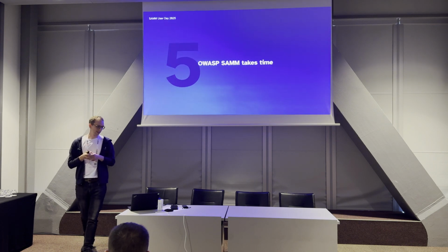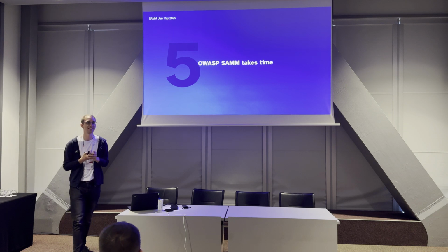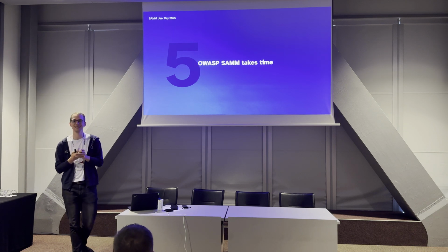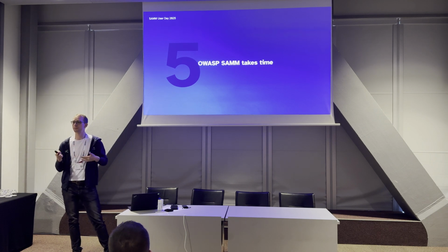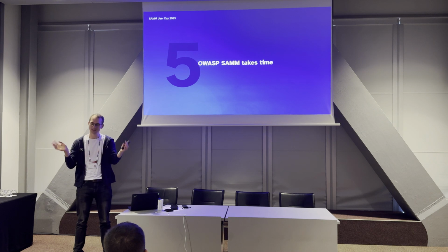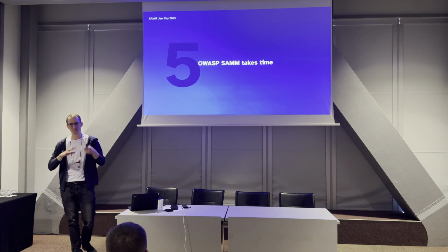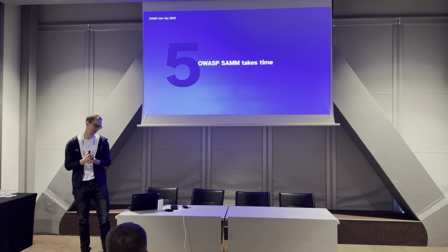And number 5 is something I think many can agree with me. OWASP SAMM takes some time. So in the first project, we were very ambitious with the plans, and we thought about implementing this, that cannot take too long. We just distribute it to all the teams, and they can work with it in parallel, and we can do some centralized stuff. And the first roadmaps we built were very ambitious, and they crashed famously.